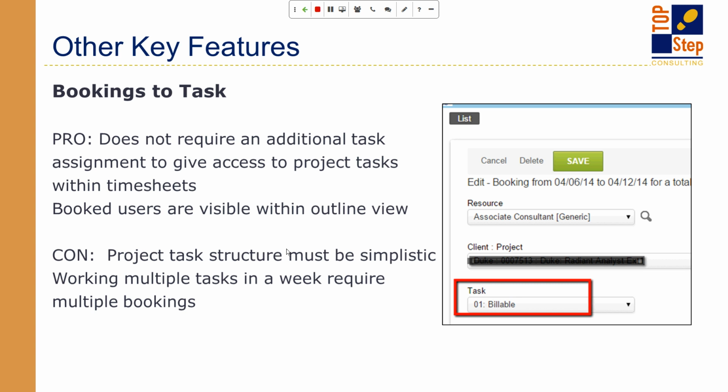So oftentimes on a project, we might have a billing rule that is set up specifically to a particular job code, right? And let's say that when we have users on a specific job code, we're going to book and include a job code on our bookings. Well, suddenly we can tie specific rates to that task based on the booking. We can forecast rates. So we put generics out there and we book our generics to specific tasks. If we have task-specific billing or recognition, we can forecast that, right, using just the bookings.